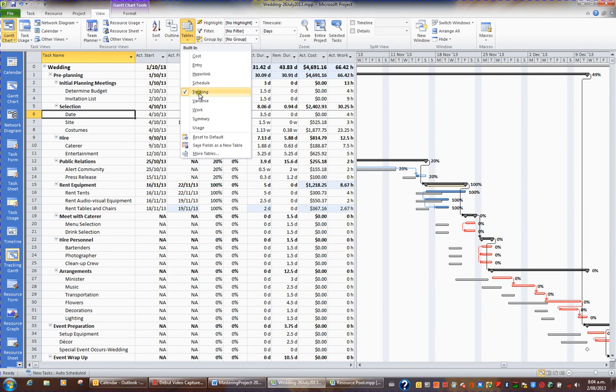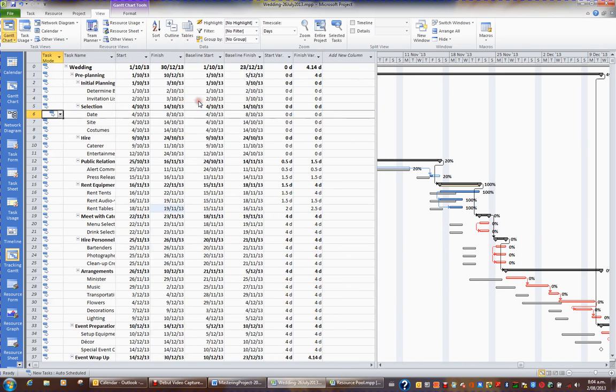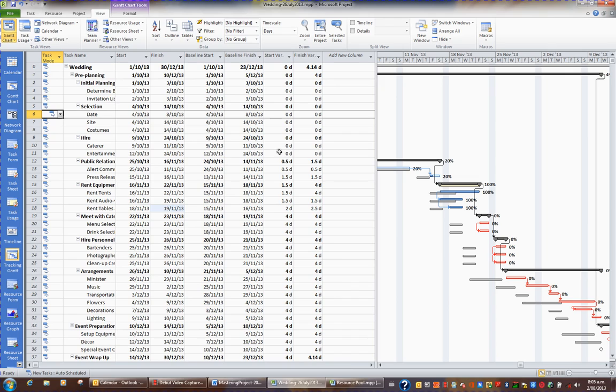We're currently in the Tracking table. But have a look, for example, at Variants. Variants will give you information such as baseline start, baseline finish, any variances in the start dates of tasks, and any variance in the end dates of tasks.